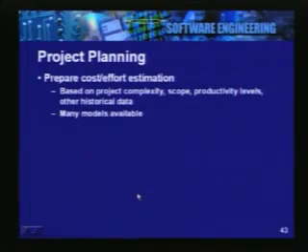Now, how do we prepare the project plan? What are the important steps that need to be taken in this? The first important step is that we must estimate the cost and effort. This is the quantification that we talked about just now, that we need to measure how much effort is involved in carrying out a project. Now, this will naturally be based on the complexity of the project, the scope of the project, productivity levels of our people who will be implementing the project, and also other historical data of similar projects.